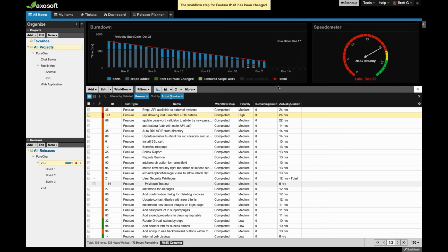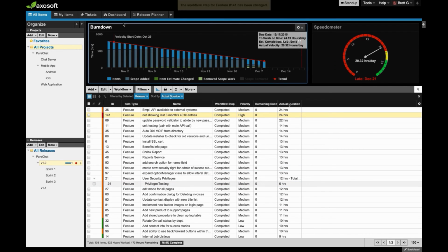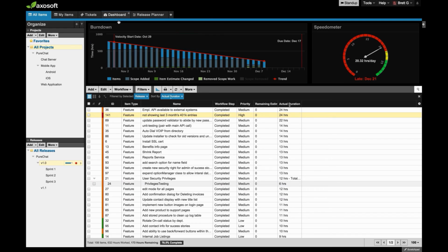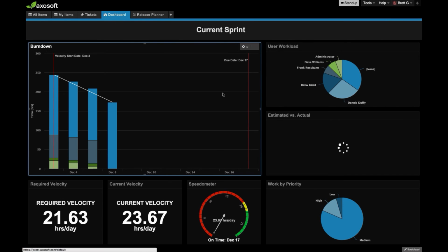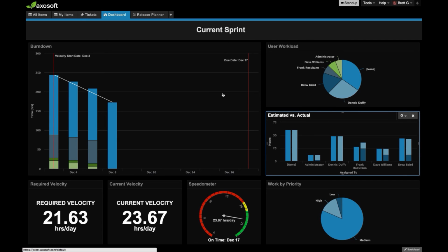Because that'll be used in the burndown chart as well as the dashboard when you're taking a look at the estimated versus actual. So even though you're not saying, okay, I worked 4 hours here, 6 hours there, it's now knowing what you know now, do you still think that item was 2 story points or 3 story points, and it just gives you a very easy way to update that item.